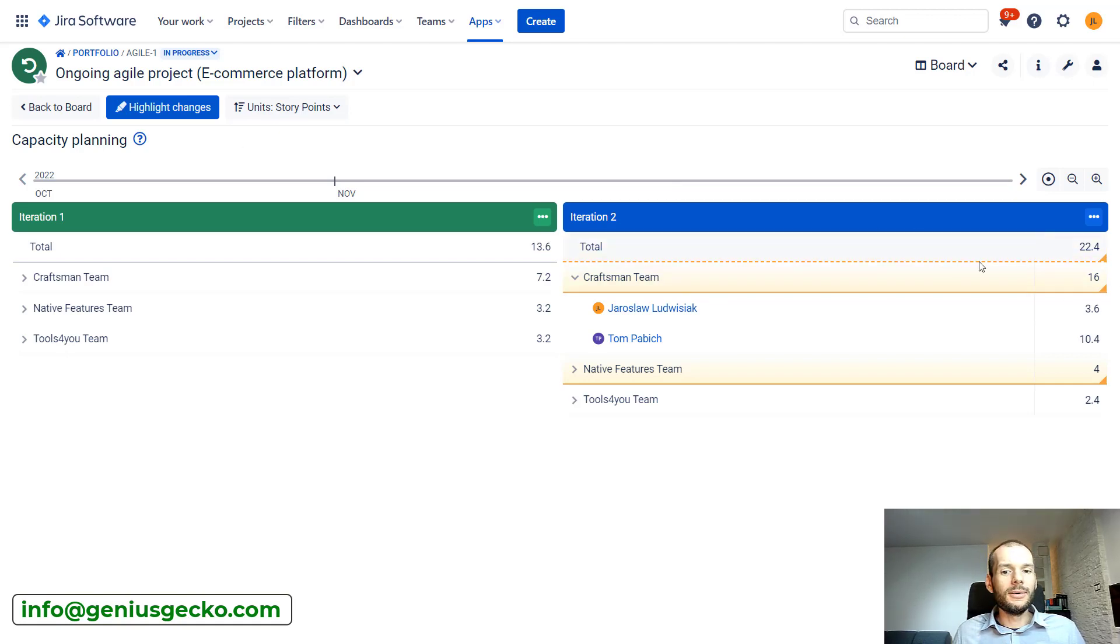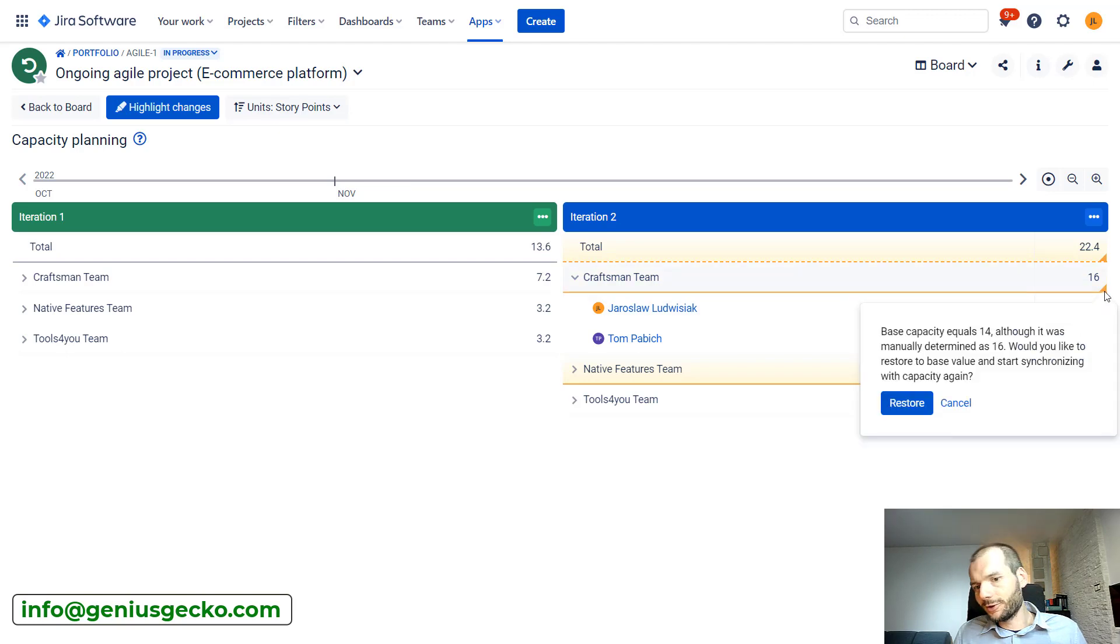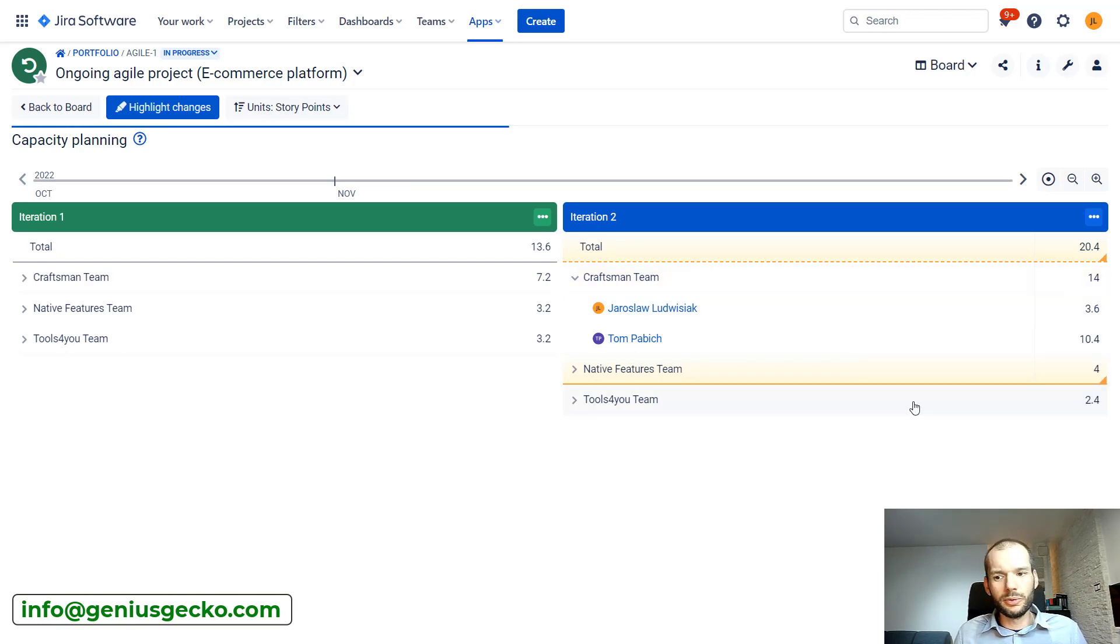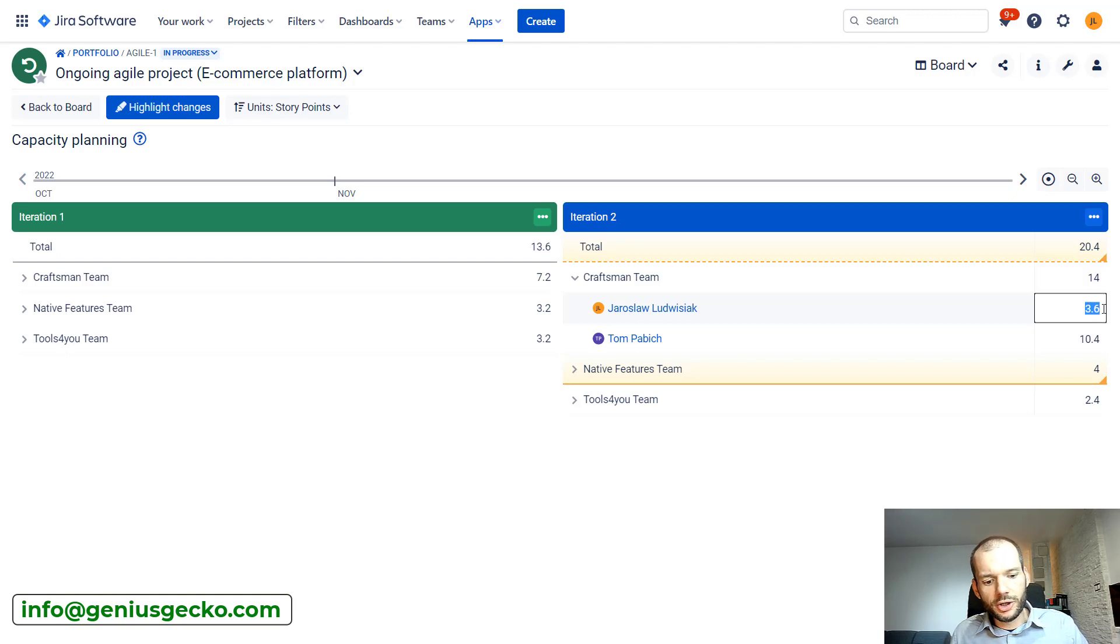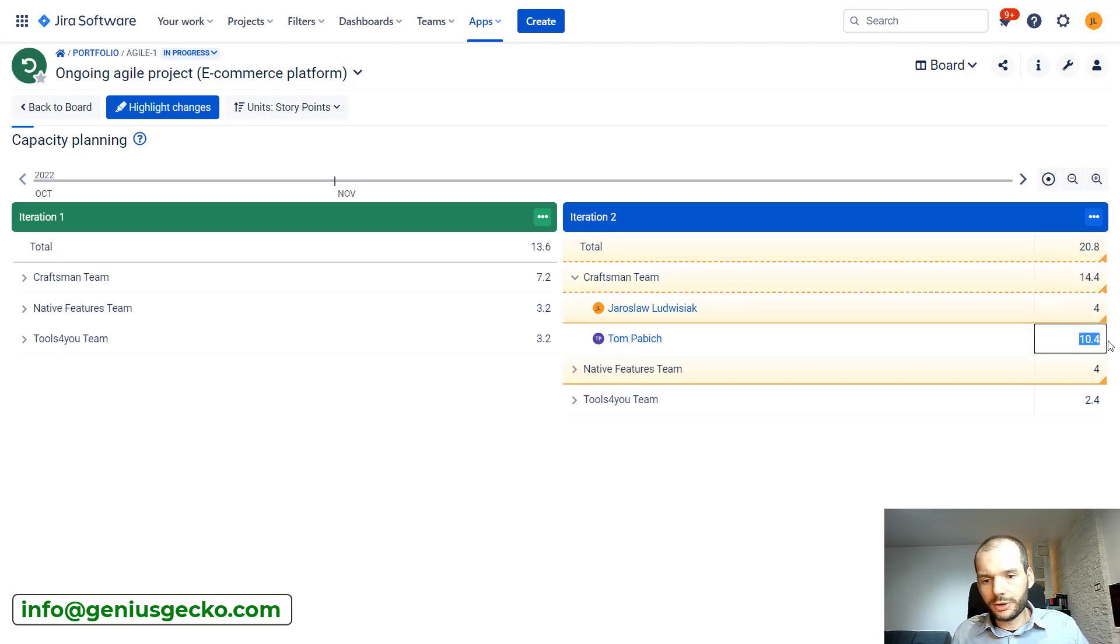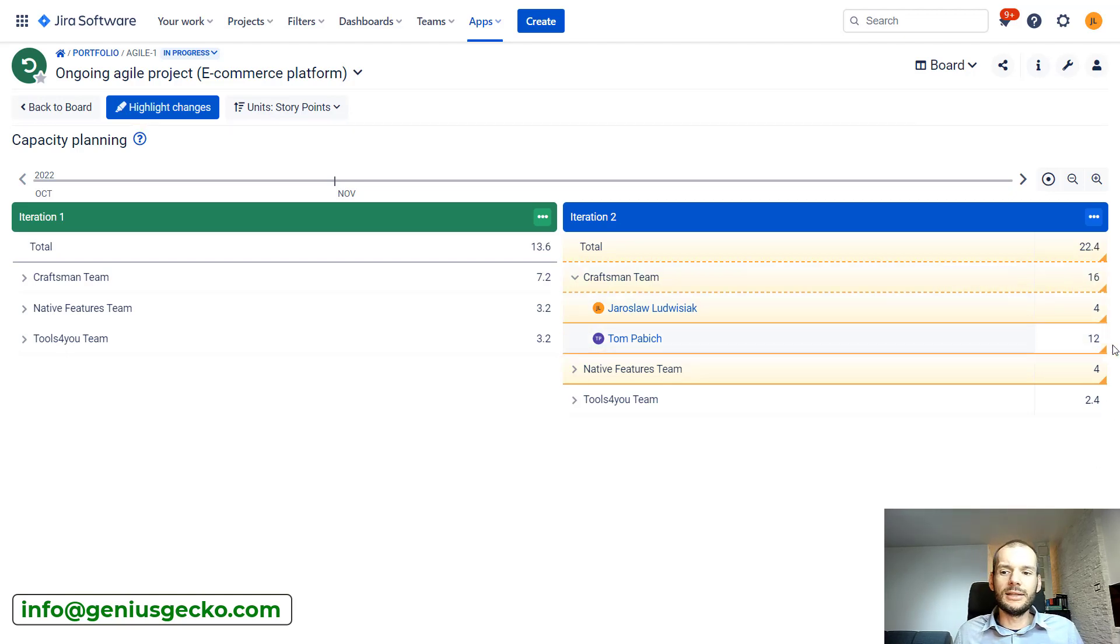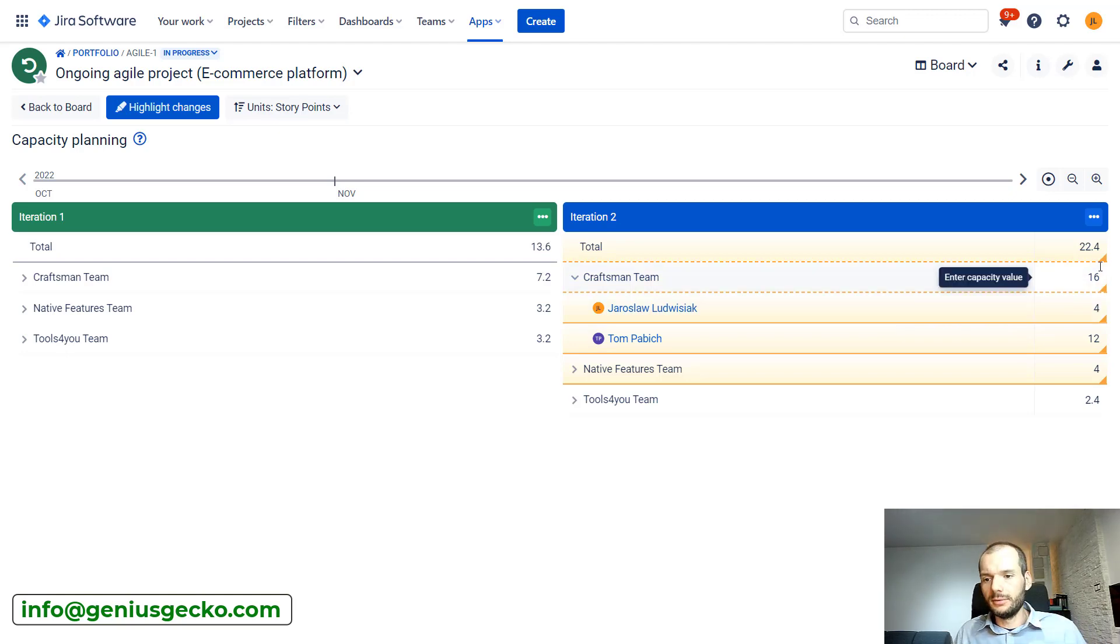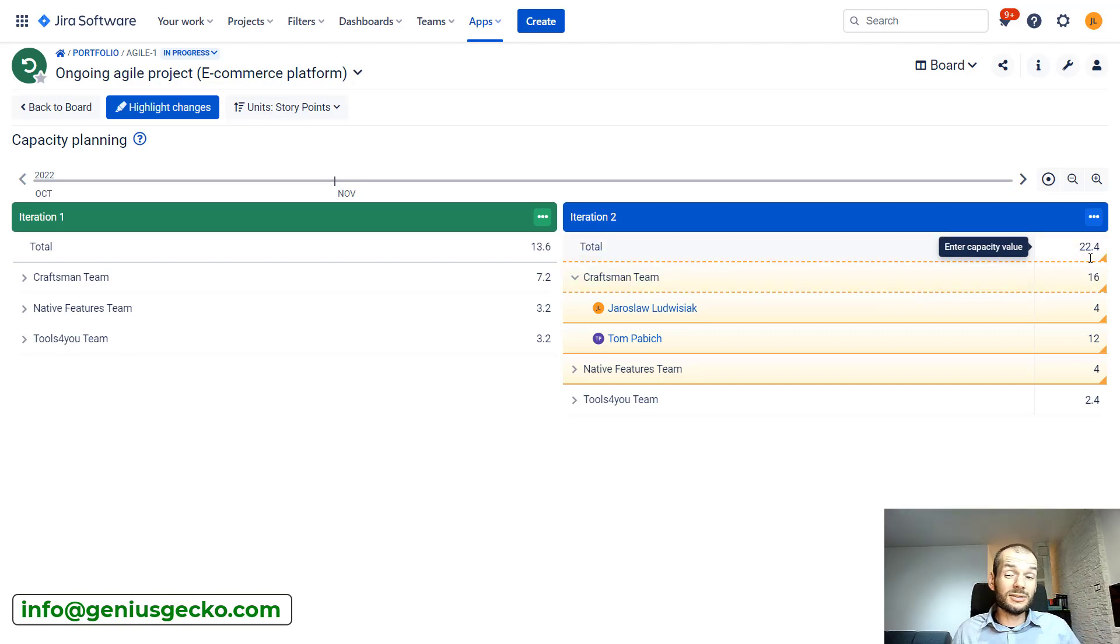I could revert the change. So I will click over here. I made a mistake. I will revert this, but I can do the change on the user level. Let's say that this will be four. This will be 12. We're 16 again. And you can see that these two elements are now highlighted. We see that they were changed. The capacity of a team is impacted and the total capacity is impacted. The result is in the end the same.